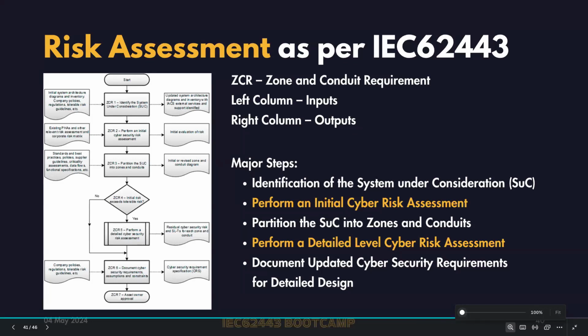If you look at the ISCS life cycle, the first step itself is assess. That is, you have to conduct the risk assessment as a first step, and then you design and implement, because based on the output from this assess phase, you take it as a cyber requirement specification and include it in your design phase.